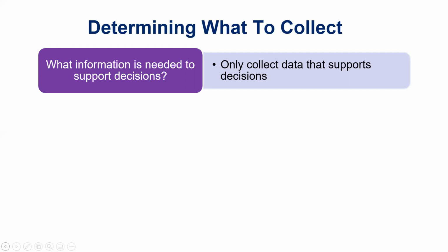I can use a visual assessment, something like the PACER method, for that paved roadway to rank it visually with a windshield survey, driving down the road from 1 to 10, and that might be good enough at the network level. But if I'm going to actually fund a project on that road, then I need project level information. I need to know how many base failures are on that roadway. I need to know the existing level of rutting or cracking. And I'm going to be taking a lot of measurements. I'm going to be gathering a lot of data. But at the network level, you don't need that much.